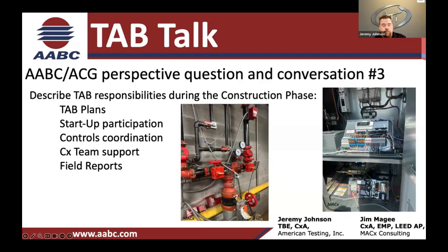And that information too, sometimes is not as transparent and open as it should be. Just personal opinion. A lot of times the mechanical contractor will hoard the report and I can't get it from them. What I do a lot when we talk about streamlining is I want to incorporate your work into my issues resolution log, so it's available to the broader team. So it's not buried. That's another way we put together.